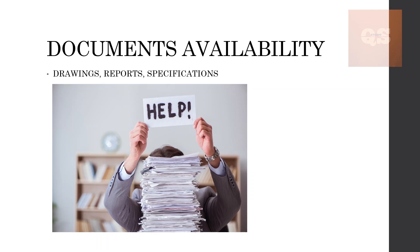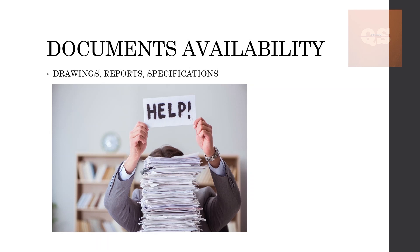Once any drawings or reports or specifications are missing, you need to put that into the query sheet. A query sheet is a sheet wherein all your queries related to the project are put up. I'll be explaining that at the end of this presentation. You can put what all drawings, which drawing numbers are not available, or which all reports need to be made available so that you can do accurate quantity measurements.